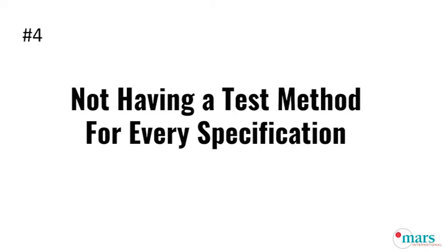So you can tell, okay, at this stage in the development, when we're doing a design validation, these are the items that we know we've tested, and we've all agreed that this is how it's going to be tested. So you may consider adopting that kind of a format for your specification, or having it as a secondary document. Maybe if you don't want to clutter up your main specification, at least having a secondary test document spec of this is how we are going to test every single one of these specifications. If you don't know how you're going to test them when you put them in, you're going to get into trouble down the road.